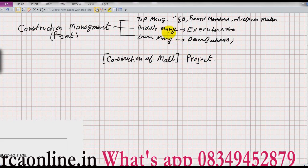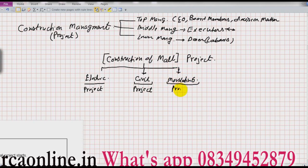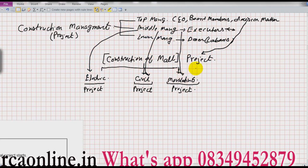If you see the construction of a mall as a project, then for top management this is the overall project. But for middle management, the construction of the mall is not the project — rather, construction of some part of the mall is their project. If somebody is from the electrical department, installation of electrical equipment is their project. If somebody is from civil, construction of the civil structure is their project. If somebody is from marketing, selling of the mall and its shops is their project.